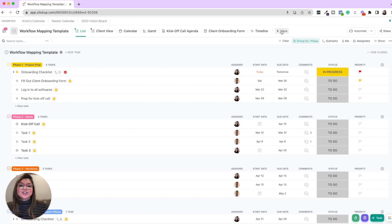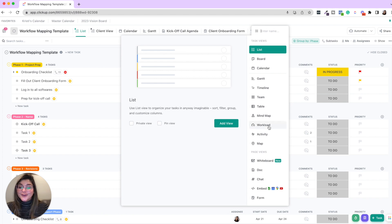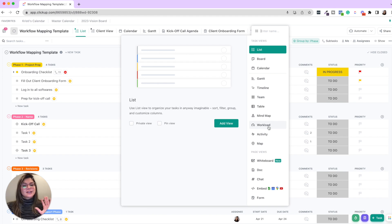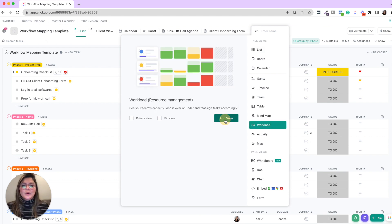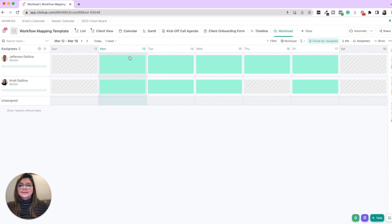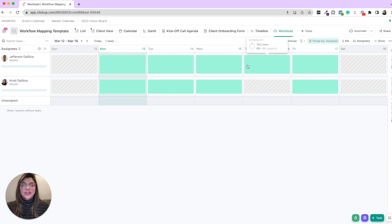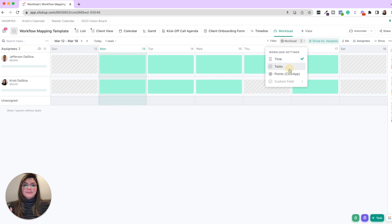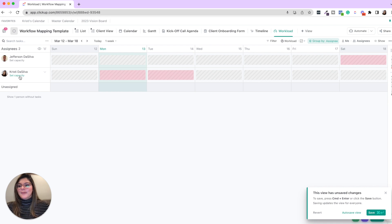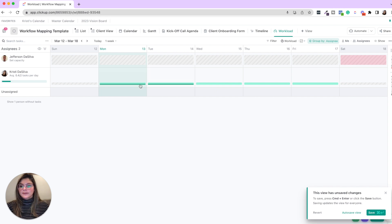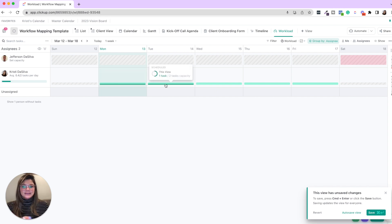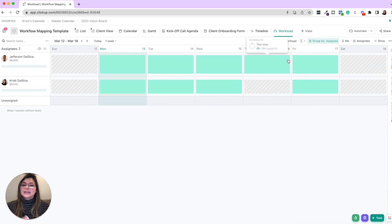And then I just want to go through a couple other quick things in terms of making sure everyone has what they need and knows what's on their task list. And then also let's talk about resourcing and capacity planning. So if I click workload and add this, what this is doing is saying anyone assigned to these tasks, we're going to see what their workload and capacity is. Now you can do this by how many tasks are on their plate. So if you set the capacity, let's say we only want Christy to have two tasks per day, then you're going to see she has one for today, one for tomorrow. So she's not at capacity.